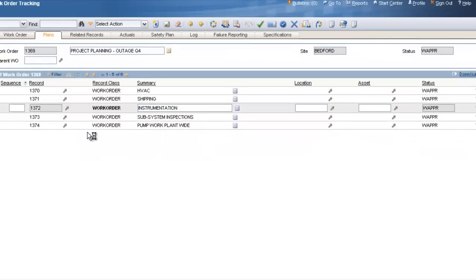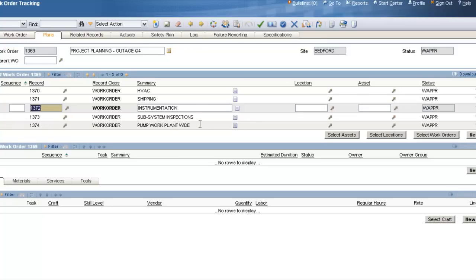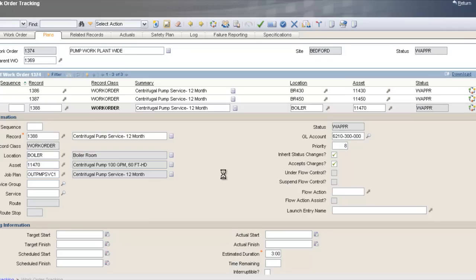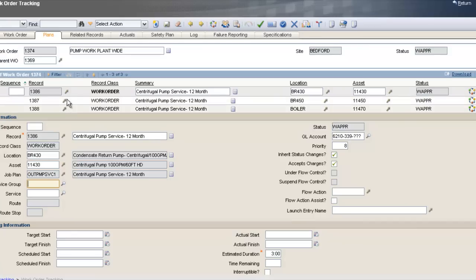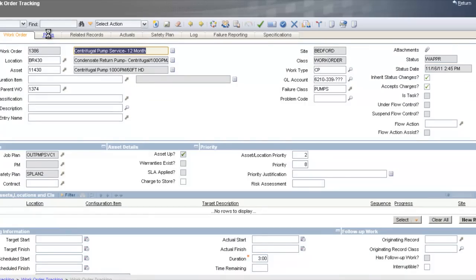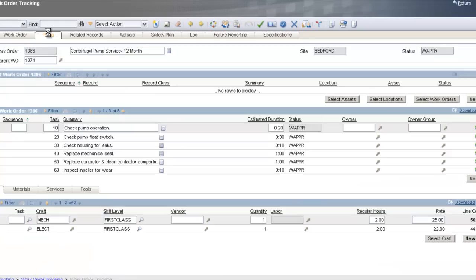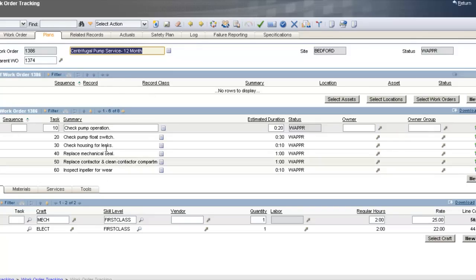Hitting Return brings me back to the project. Now I can keep going and do all departments the same way. I want to jump down to hierarchy to look at something. Each department got their work order, planned their work, and put their own child work orders on their department work order with a job plan for each. Hyperlinking down the hierarchy to a lower-level work order — say, one for pump service — on the Plans tab it has a parent but no child. This is the lowest level, and its job plan has a complete list of all tasks, crafts, materials, and tools.